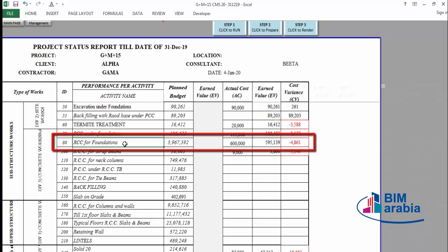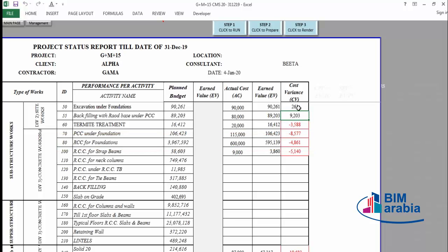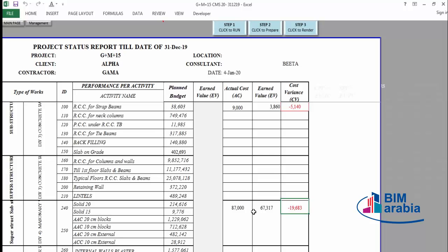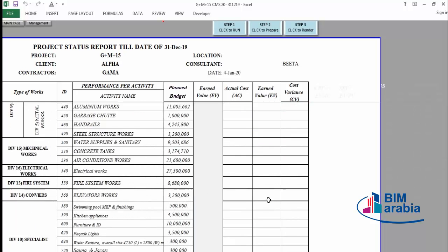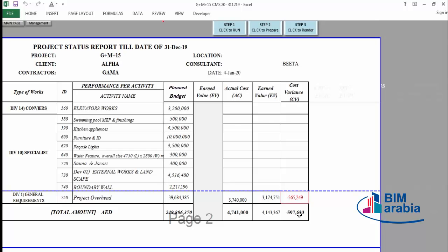For example, the RCC foundation earned value is 595,000 — that is the value of 15% completed work, which is 15% of the planned value for that activity. We are over budget in this activity. We are within budget for backfilling and excavation but over budget in block work. Totally, we are over budget by 597,000 dirhams. This is calculated as the variance between the earned value — the value of completed work — and the actual cost paid.